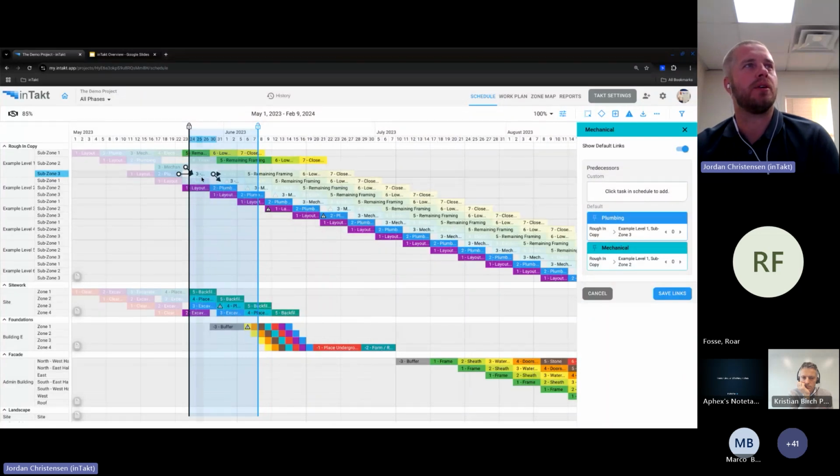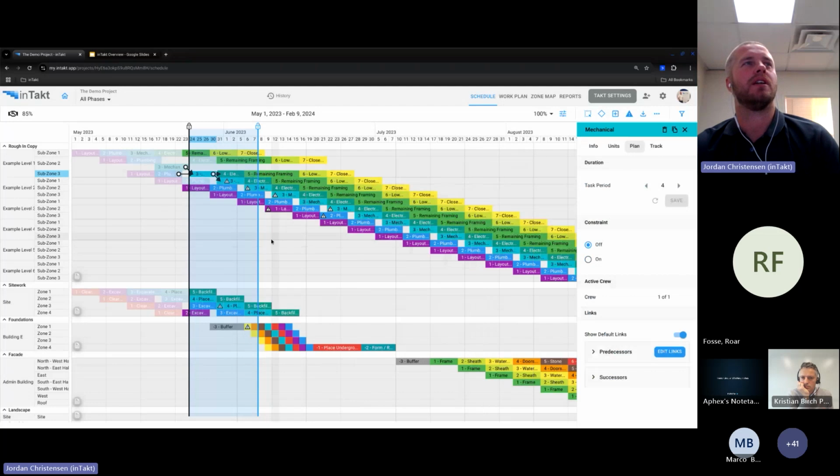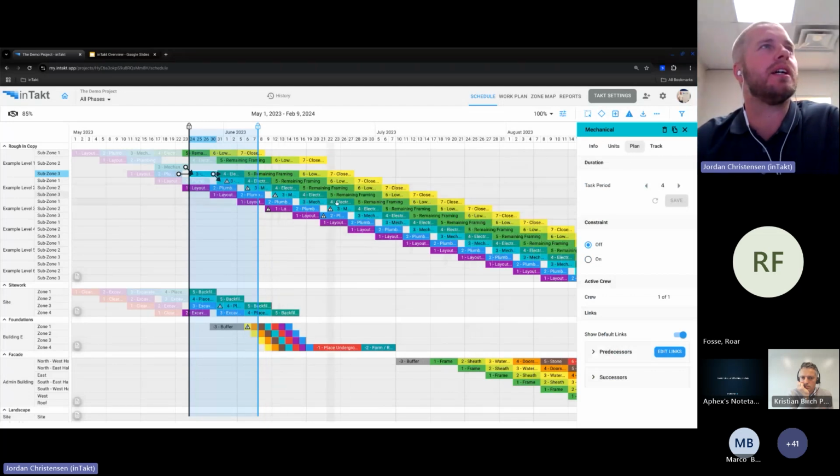We've done that right here, where on the task that you're clicked on, it's going to make every succeeding task to the nth level transparent, so you cannot select those and create logic loops. So if you've ever been in a CPM schedule and created logic loops, it can be sometimes a nightmare to fix that mess. So we've eliminated that problem with the software here.